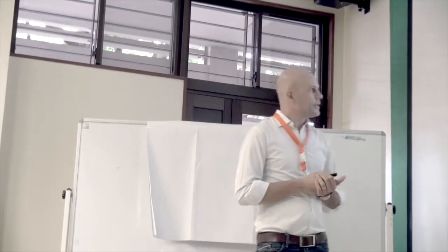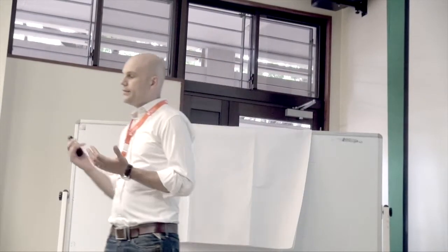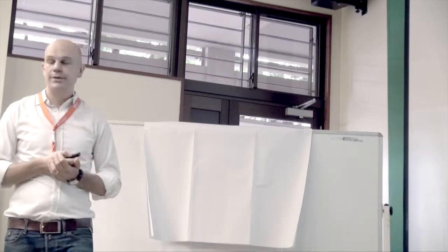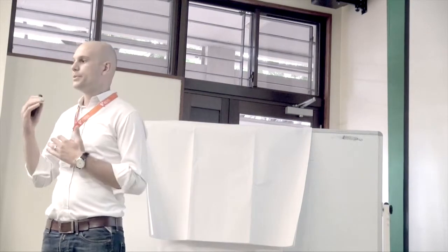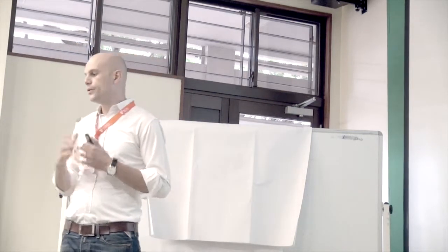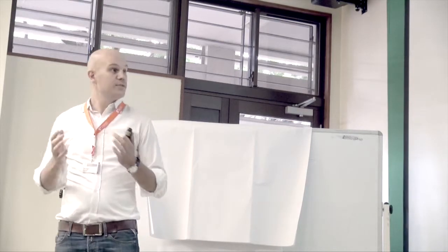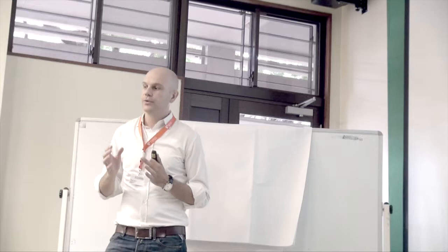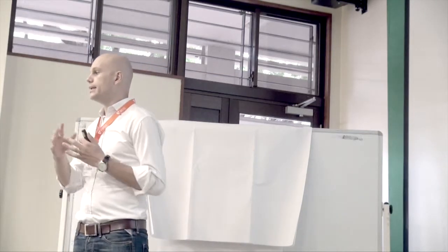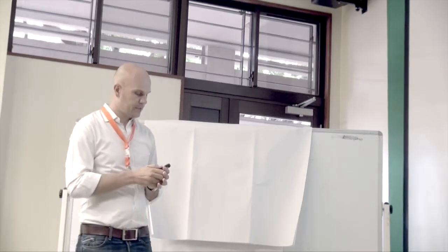And we also do sprints, of course, one to four weeks. And deliveries to QA can be even more than one time per week, can be several times per week. The purpose of that is to keep the number of bugs on a low level for each release, so we can focus on the most important things in the beginning. When trying to solve issues, it's always cheaper to solve them early than later on. So that's why we do a lot of testing in the beginning, which this one will show.